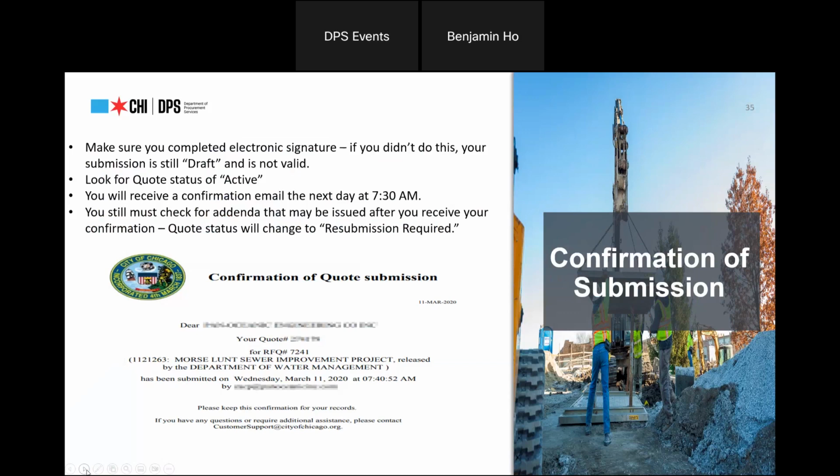After you do that, you must still check for addenda that might be issued. Because if you don't, the system will change your quote status to resubmission required, and that will not count your bid at bid opening. So make sure you keep following up. Next slide, please.